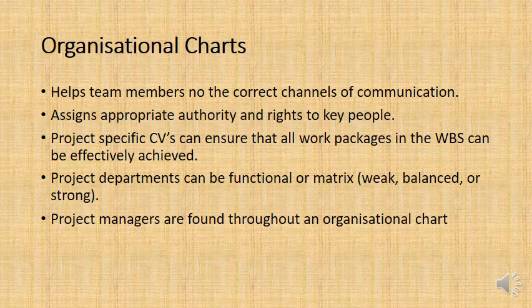Now, the first thing that helps with that is actually having project-specific CVs for everyone. These are CVs which are not telling you the person's every skill, but skills that are specific to the work packages that they're achieving in the project. And then from that, you can place them in project departments where they are placed with similar people who are doing similar work packages, or they could be working with them on the same work packages.